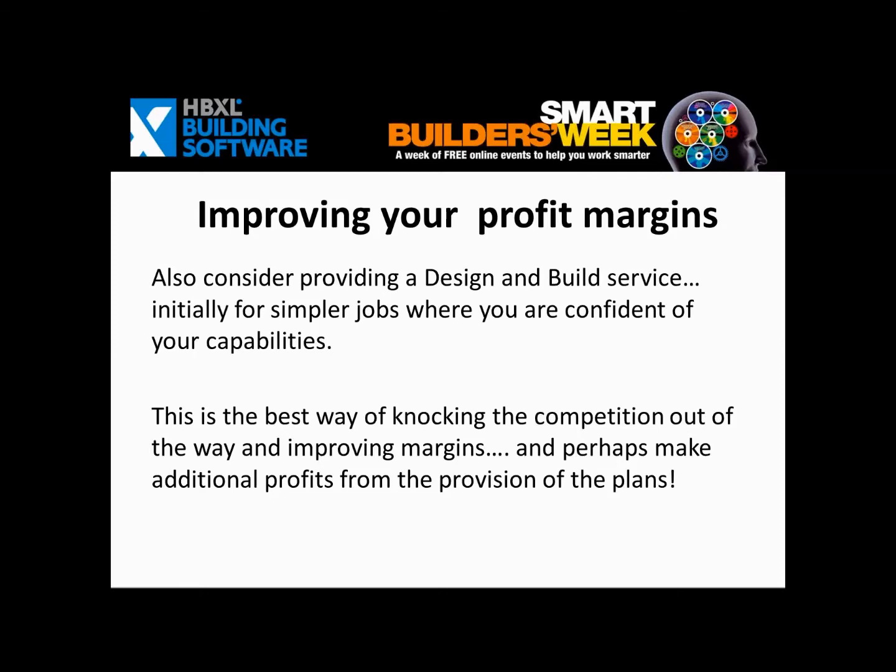Another big challenge for us all is keeping track of the building material prices. As we've all seen in the last few months, prices are on the move. It's very difficult to keep track of them, so you actually need to build in a margin there to take into account the effects of inflation. And again, that's very difficult to do manually. It may be that you're not starting a job for 6 months and it's going to take you 6 months to do it. So by the time you get to the end of that job, your prices are going to be 12 months old. So if inflation's moving at 5 or 10%, all of your profit at that end of the job will evaporate. So you need tools to be able to cover that phenomenon. Again, how do you do that manually? It's virtually impossible. You need to think about software.